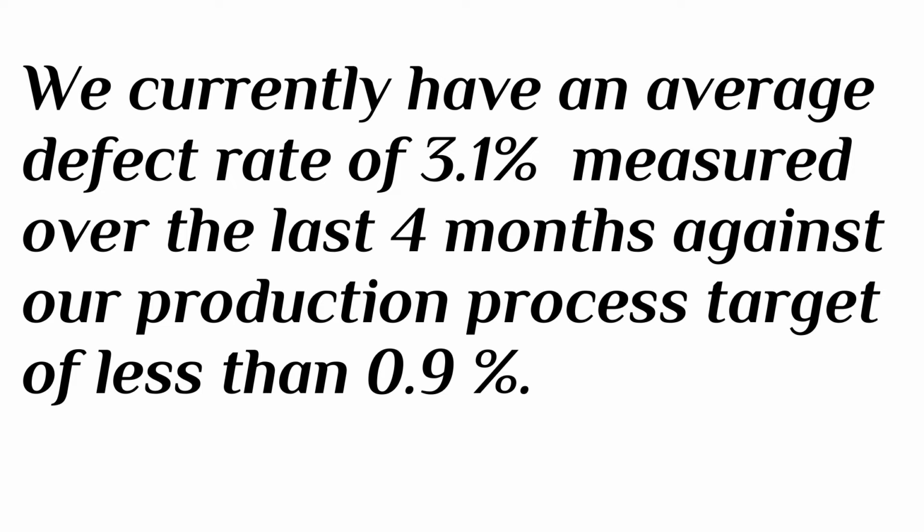Let us understand the opportunity statement by an example, which is in continuation of the business case that we have already seen. So here is the example of the opportunity statement. We currently have an average defect rate of 3.1%. So he has already described the pain. We currently have an average defect rate of 3.1% measured over the last 4 months. So you have to give the time period as well.